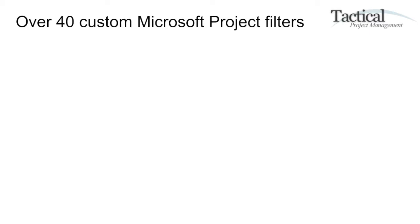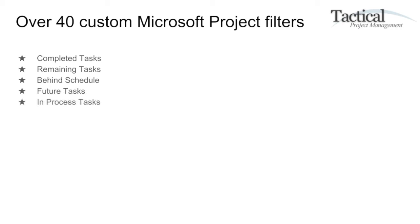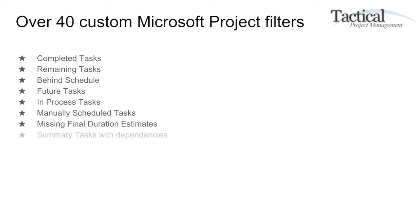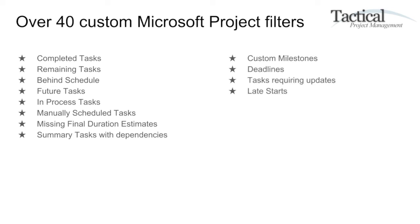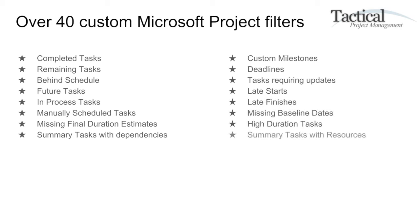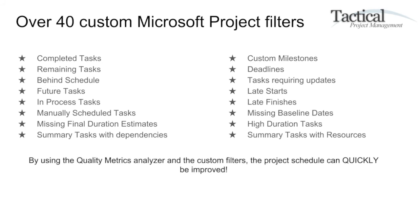Included in this tool, there are over 40 custom Microsoft Project filters. They cover completed tasks, remaining tasks, behind-scheduled tasks, future tasks, in-process tasks, manually scheduled tasks, missing final duration estimates, summary tasks with dependencies, custom milestones, deadlines, tasks requiring updates, late starts, late finishes, missing baseline dates, high duration tasks, and summary tasks with resources. By using the Quality Metrics Analyzer and the custom filters, the project schedule can be quickly improved.